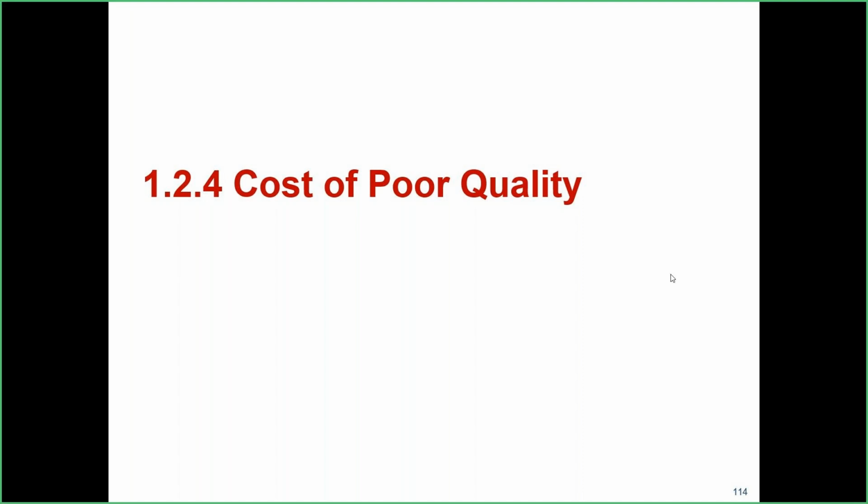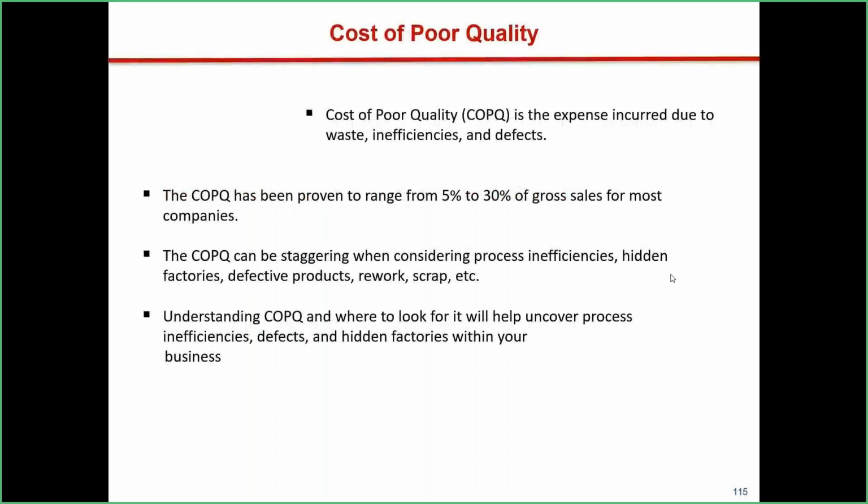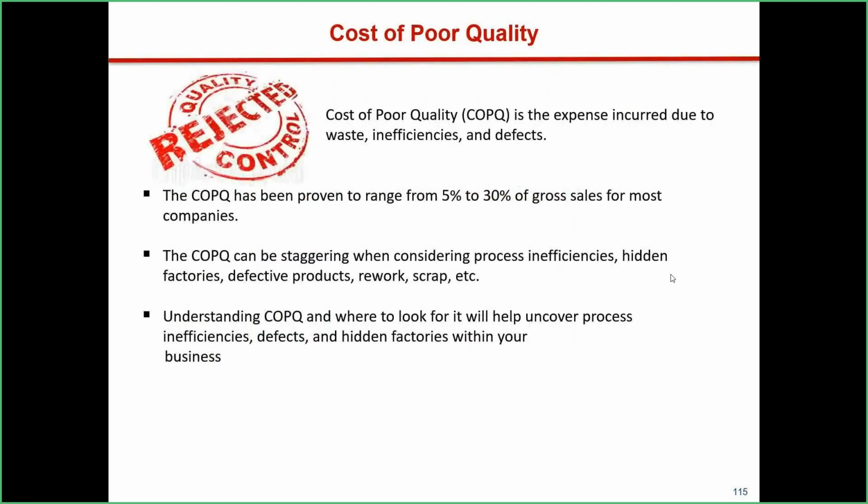All right, so moving on to cost of poor quality. Now this is very, very important again. What does cost of poor quality stand for? Cost of poor quality is the expense incurred due to waste, inefficiencies, or defects in the process. COPQ has been proven to range from 5 to 30% of gross sales for most companies.